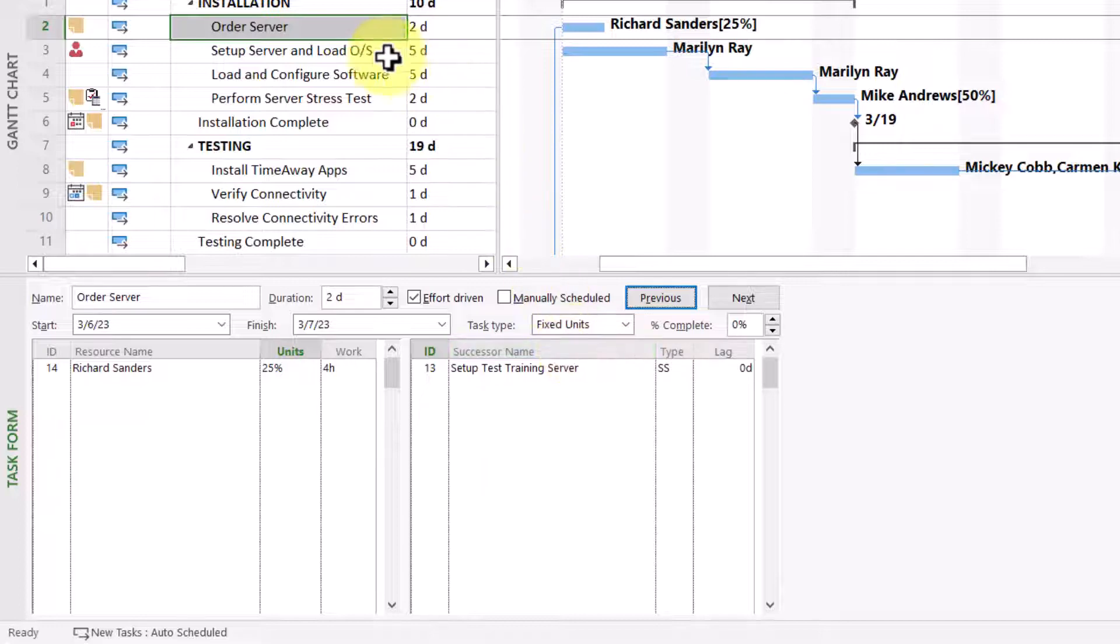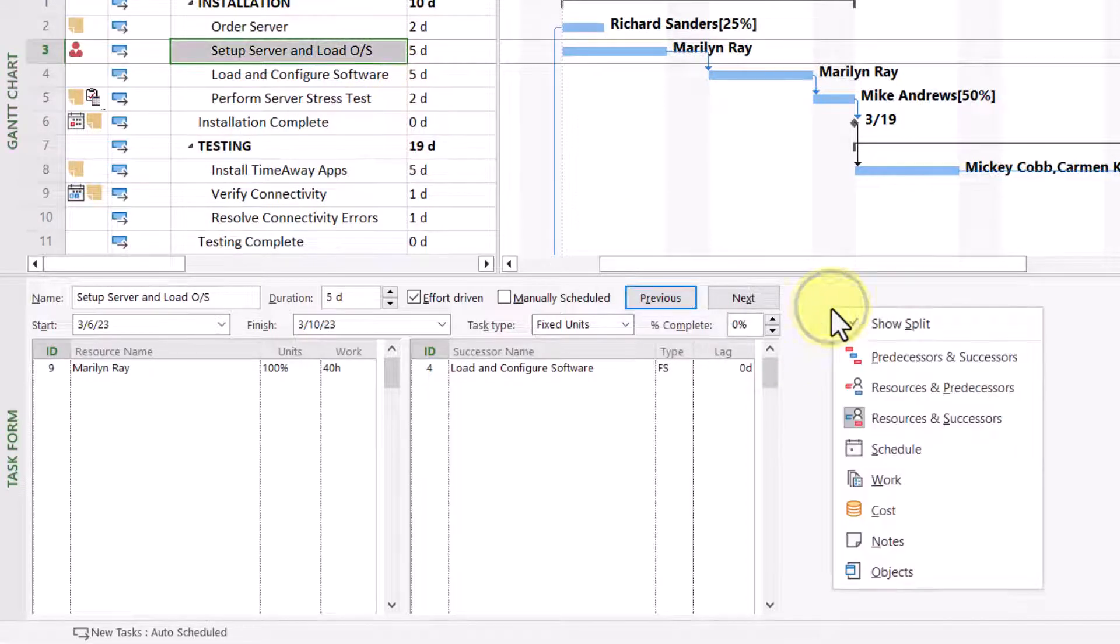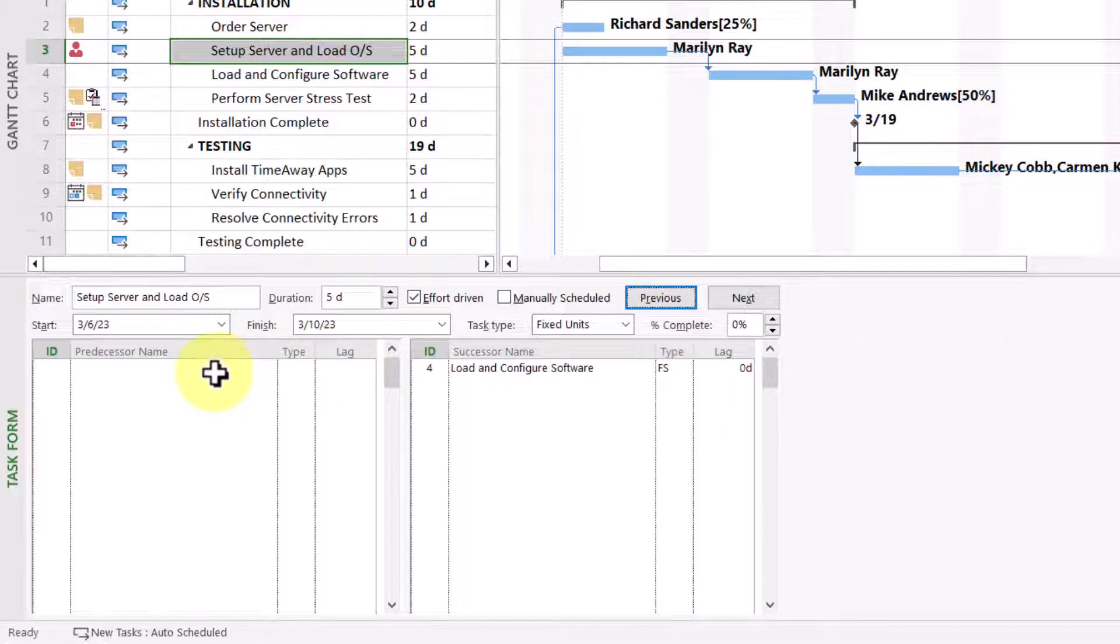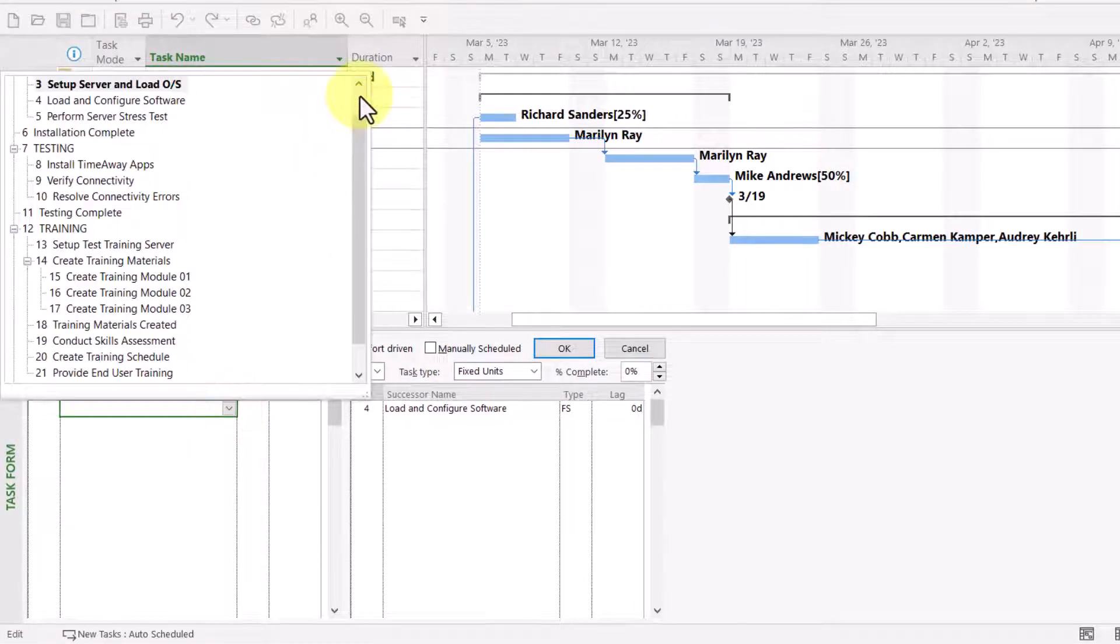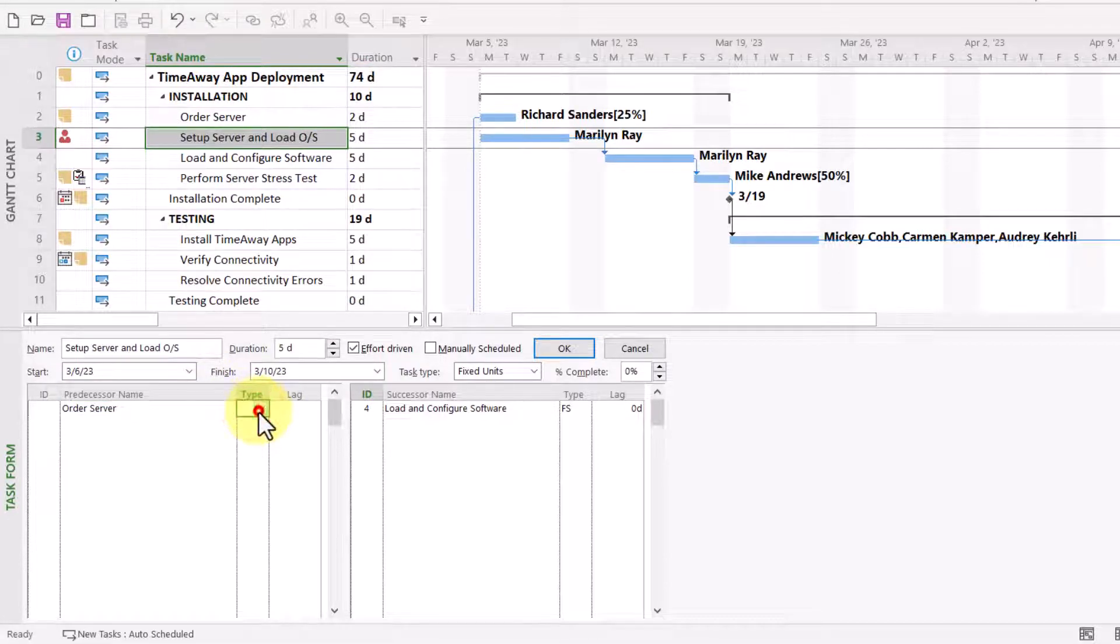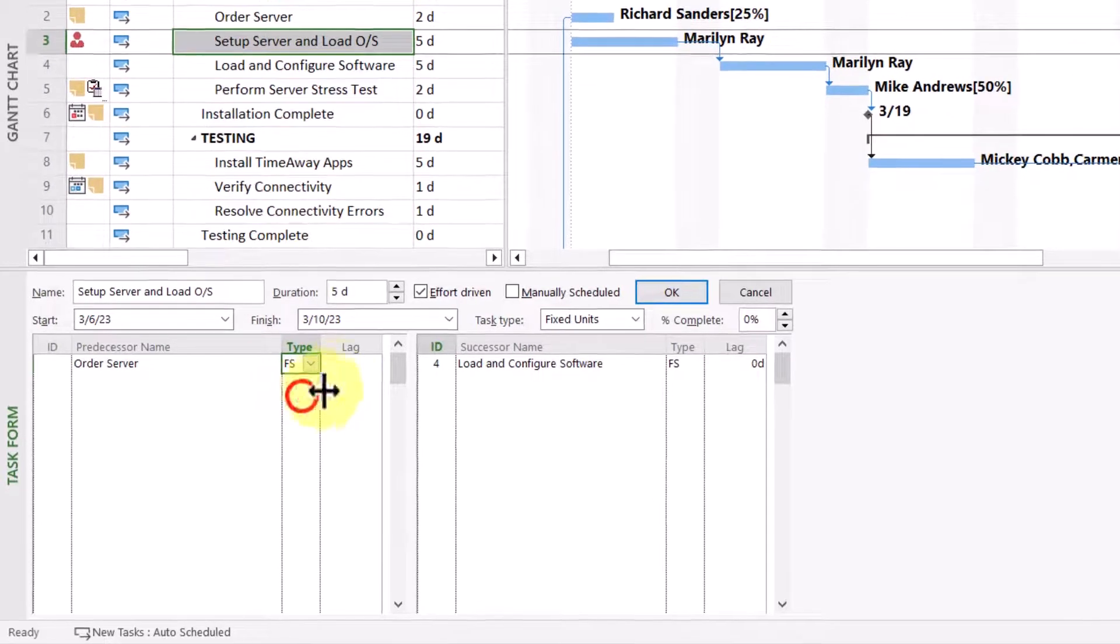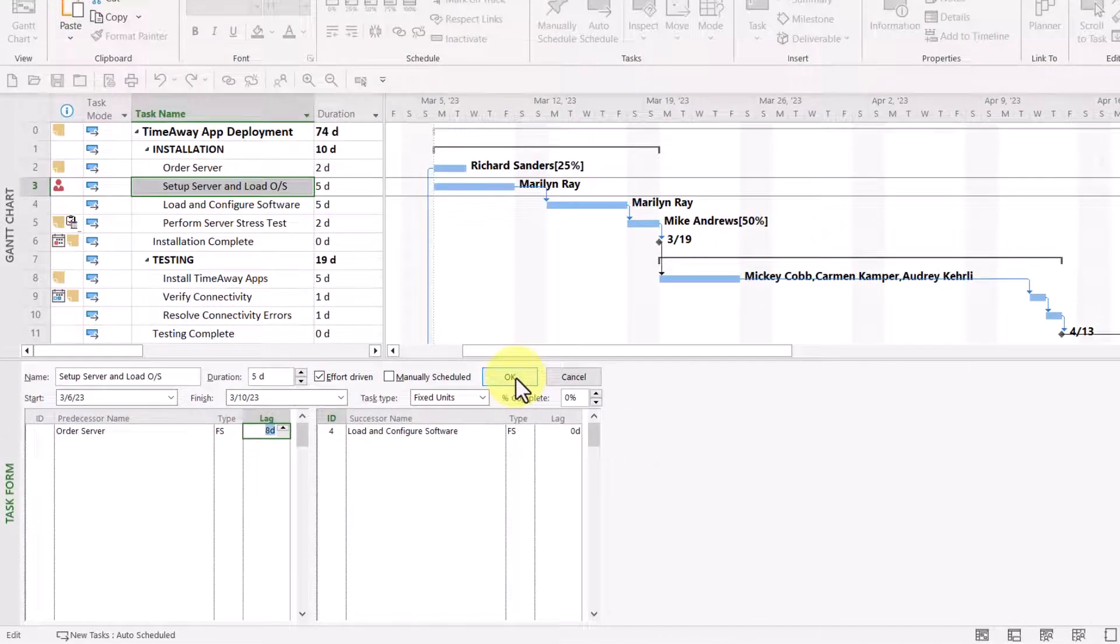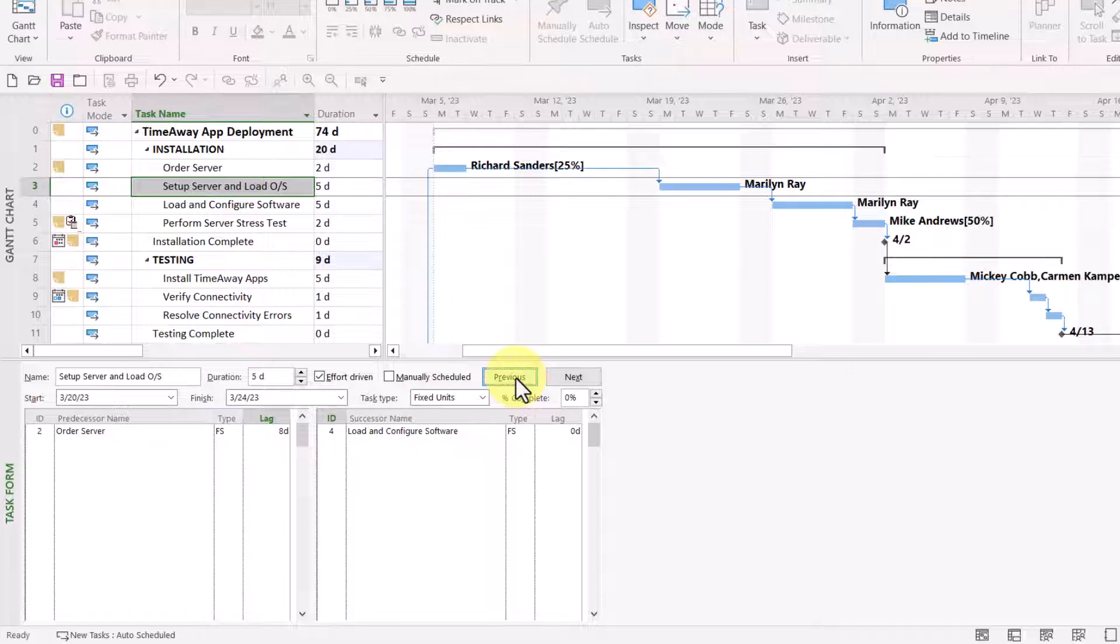So, let's go ahead and take a look at another set of details, and this one I find very interesting. It's called Predecessors and Successors. This is a set of details that you can actually use for specifying task dependency relationships. For example, on task number three, I'd like its predecessor to be task number two, Order Server. The dependency relationship I want is the default, Finish to Start, but I do want eight days of lag time to account for the amount of time we need to wait for the server to be delivered after it's been ordered. When I click the OK button, there! I just set task dependencies using this set of details.